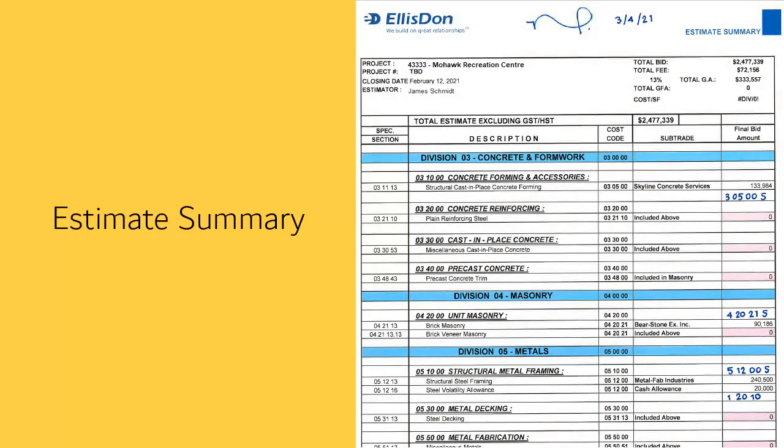Here is an example of an estimate summary. A project manager may decide to code differently from the original estimate based on the requirements of the project. An example of this can be where the project team needs to track an item separately, as they may require approval from the client to use the funds on a specific item. If you would like more information on coding an estimate, reach out to your cost accountant or reach out to a project manager who's had prior experience with a similar type of project.